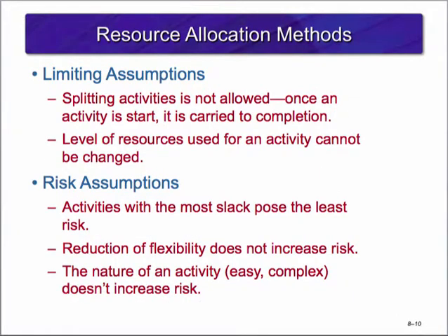The rest of this lecture will depend entirely on the assumptions we're going to discuss now, so please don't skip over this portion. These will be our limiting assumptions. First, splitting activities will not be allowed. Once an activity is started, it will be worked on until it has been completed. Also, the level of resources used for an activity cannot be changed. Please note, these limiting assumptions do not exist in practice, but are used to simplify learning.